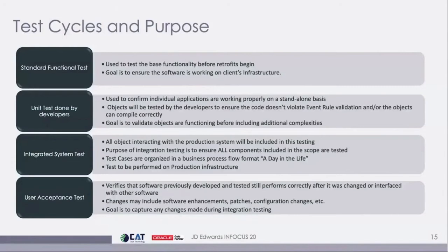That test is to ensure that all related rights on all third-party applications and all integrations are done and complete before we start the integrated system test. We put those into test cases and organize them by business process flow. That's that DILO, or day in the life, type of testing.